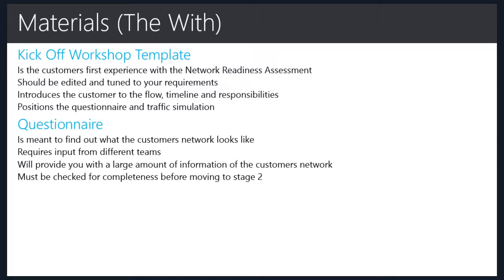great job. It introduces the customers to the flow, timeline, and responsibilities within the network readiness assessment. It positions the questionnaire and positions the traffic simulation. The questionnaire itself is a set of questions that the customer must complete for each site that they want to deploy Skype for Business in.